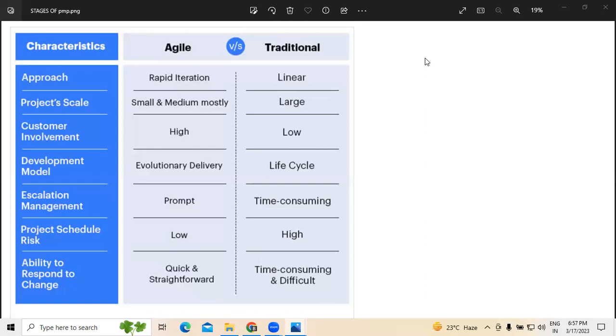Scrum Masters will see, for example, if there is a sprint we have taken, which is for 2 weeks, generally working days will be 10, right? 10 working days means how many hours they'll work, right? So I'm talking about capacity planning. In reference to that, how many hours on average do they work? 6 hours. 6 into 5 members, 30 hours. 30 hours into 10 working days, 300 is the maximum capacity. Maximum capacity a team can spend in 2 weeks of the sprint.